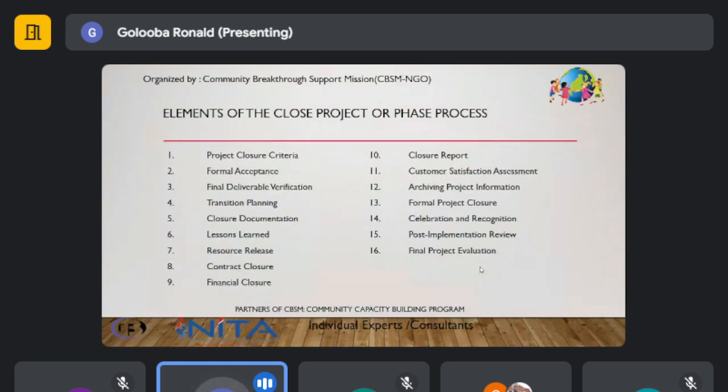Sometimes you may have money that isn't spent, and they may review and tell you to have a no-cost extension where they aren't giving you any funds, but they are giving you more time, meaning that they are making changes to their schedule such that they are able to implement the project until all the funds are spent.